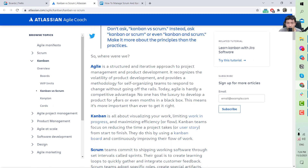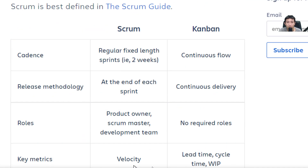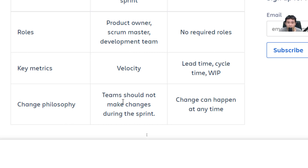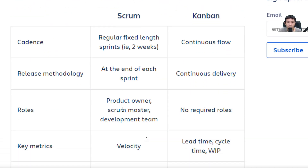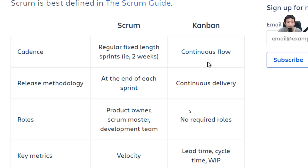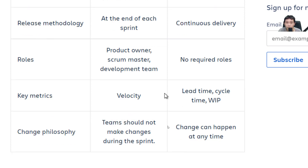For Scrum, you divide tasks into sprints lasting around two to four weeks. When planning a sprint, all tasks must be prepared in advance, and changes are not encouraged during the sprint. For Kanban, you don't need to plan things ahead — tasks can be created and developers can work on them immediately, without dividing things into sprints.